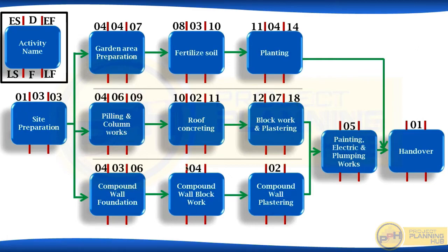Next, compound wall block work. When will it start? Compound wall foundation will finish on 6th. So next day 7th compound wall block work will start. Now duration 4 days. So finish date will be 10th.